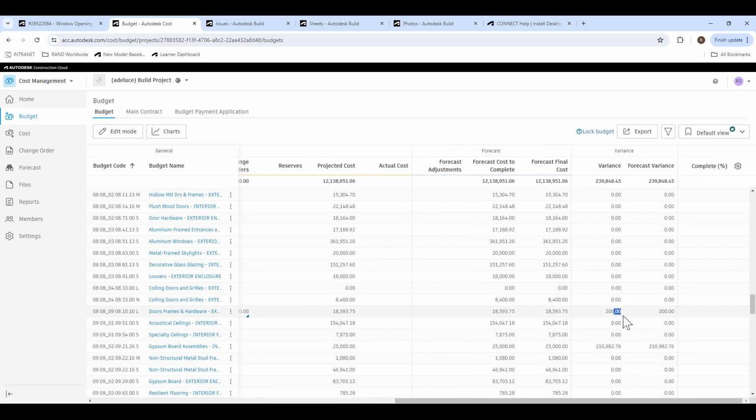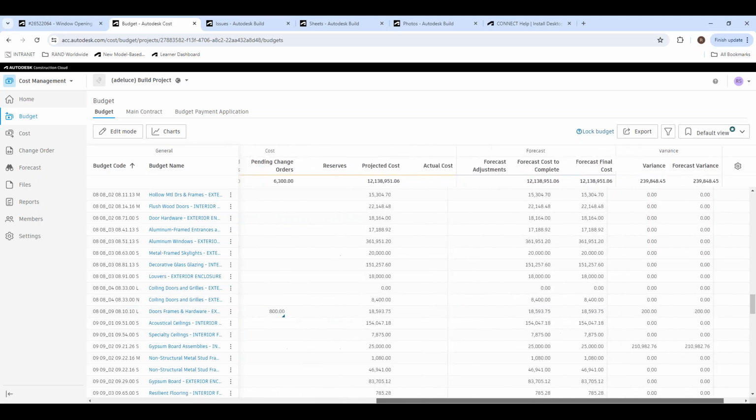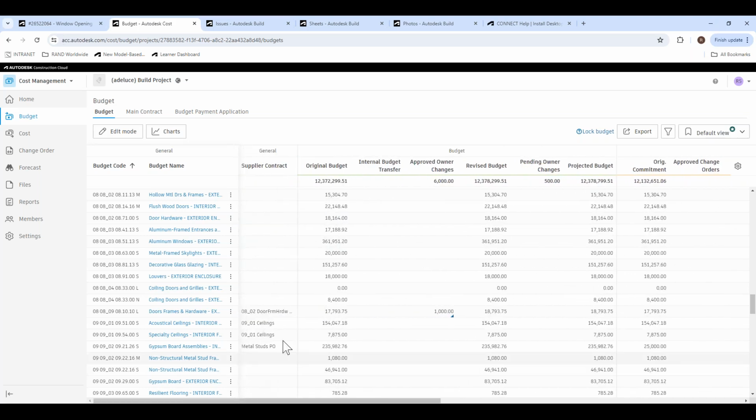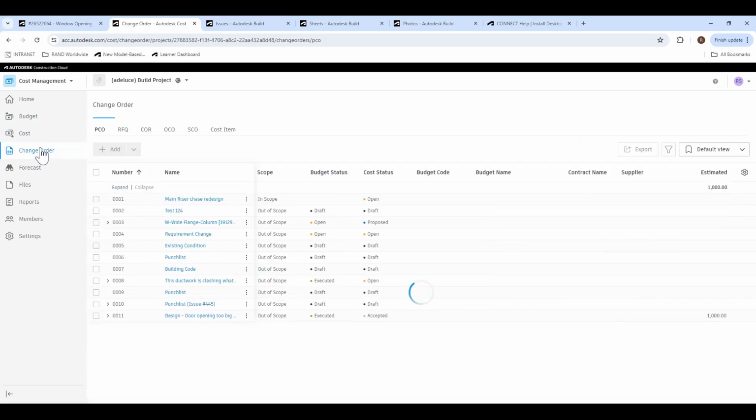And then it's going to be your contract value with the new change order. And then this is the difference between the new value committed costs with the budgeted amount there. So you can really start to keep track of these change orders against your budget as well as your contract, essentially, both on cost and budget.